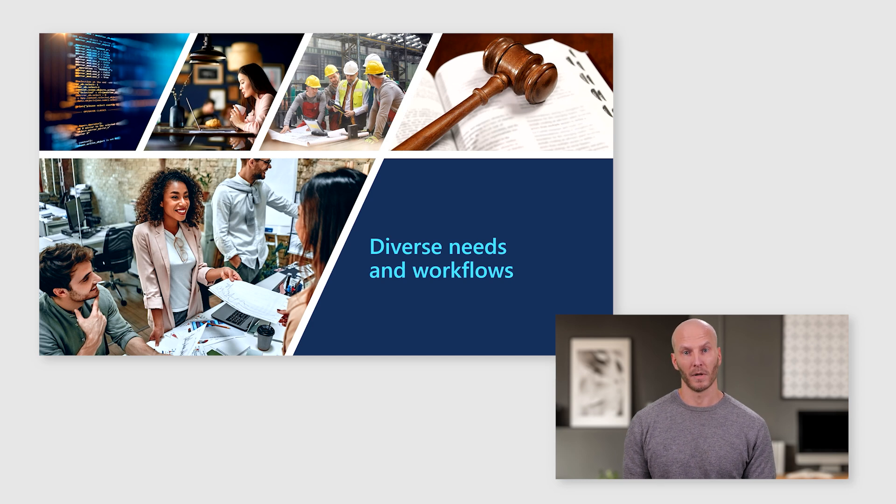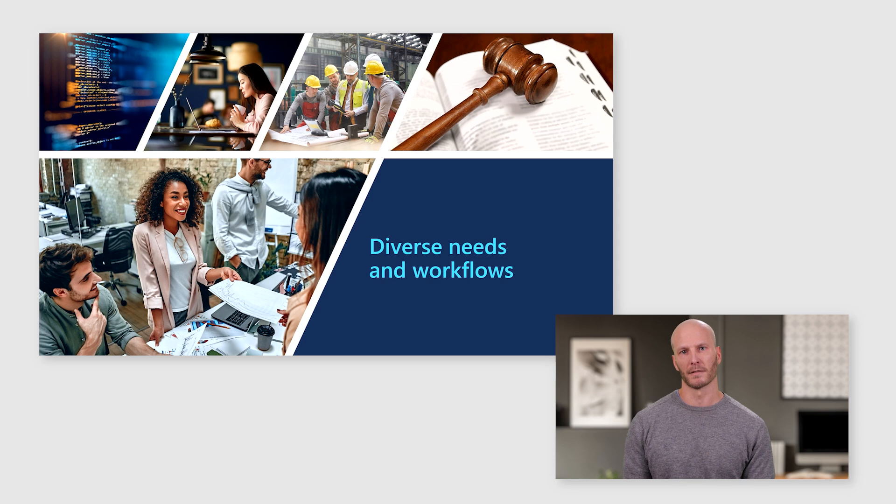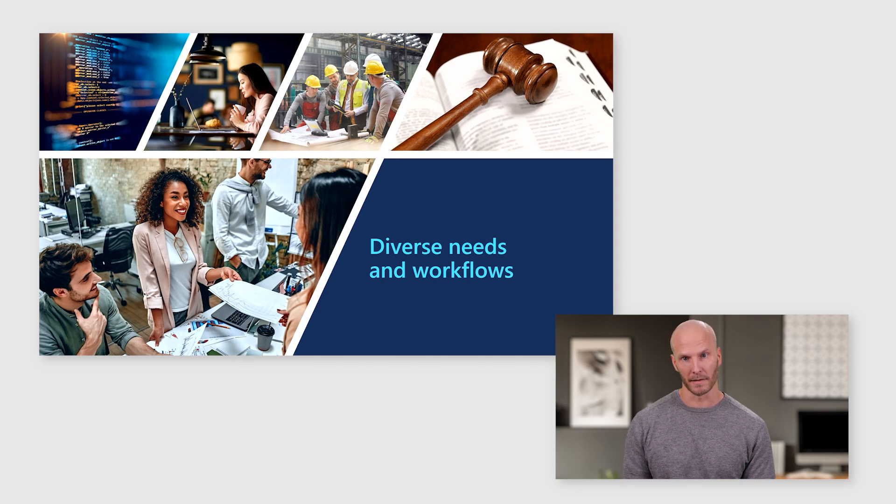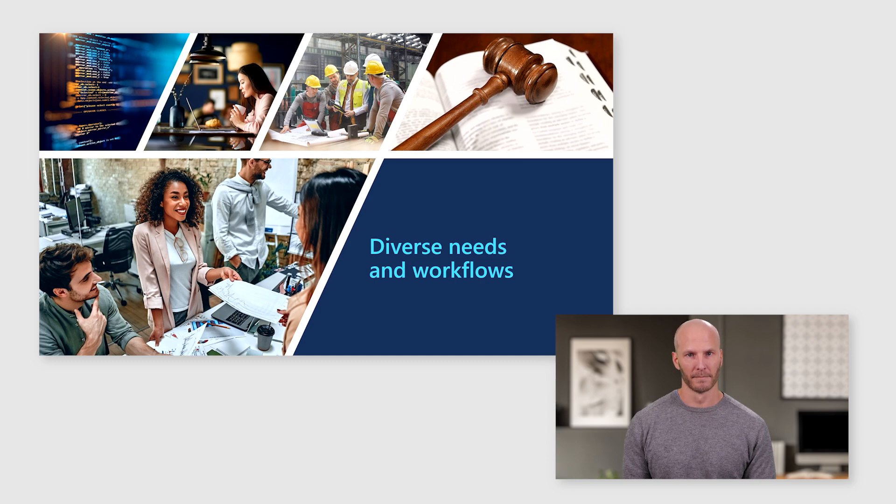If you have a team in Europe that you need to support, you may need to think about data residency, which means that project information for that team needs to be stored in a European data center.